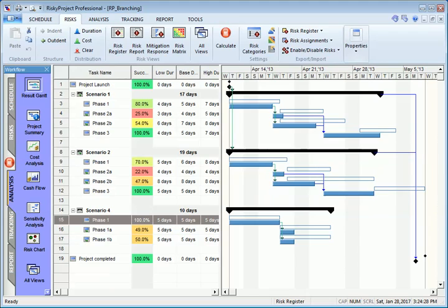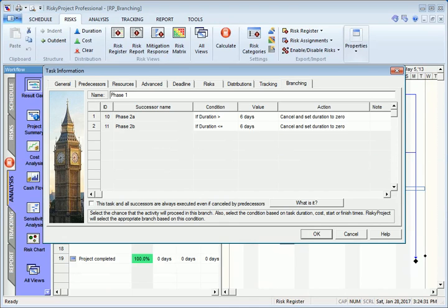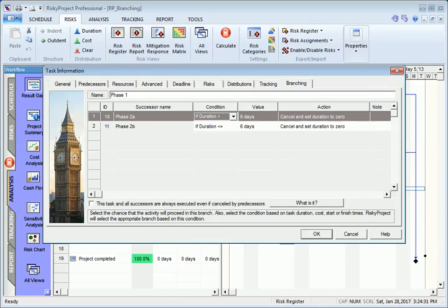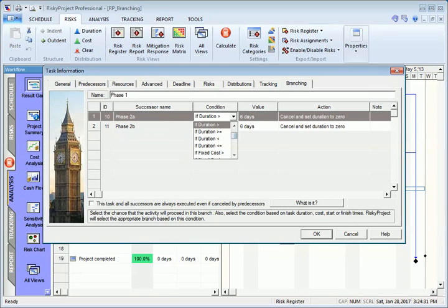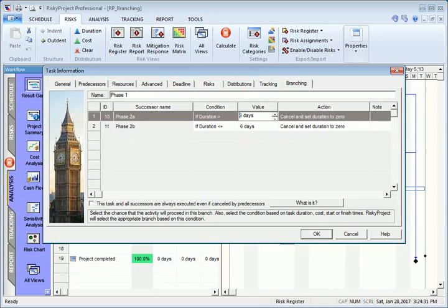Conditional branching is defined in a similar fashion. In the Branching tab of the Task Information dialog, select a condition for specific branching. For example, you can set task duration as greater than 6 days.